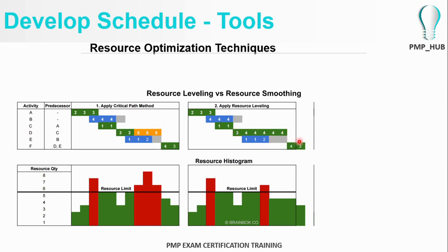Note that the project schedule has shifted because of resource leveling. You can also observe from the original schedule that there is a float period, which signifies that this activity is not on the critical path.